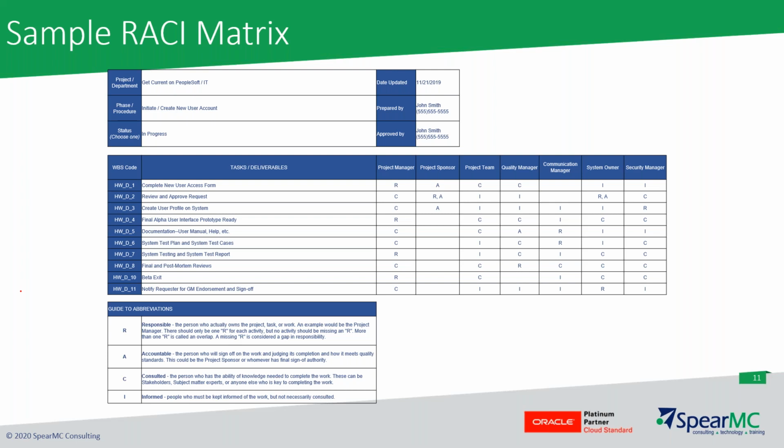Obviously, you need the consulted if you need additional clarity on what the task is and how it should be executed. And then of course the I is informed. People at the higher levels usually fall into this bucket. It's folks that want perhaps a weekly or monthly or quarterly update on where we're at with individual tasks or at a project or program level. So really a cool tool to keep track of throughout your projects, your larger projects for sure.